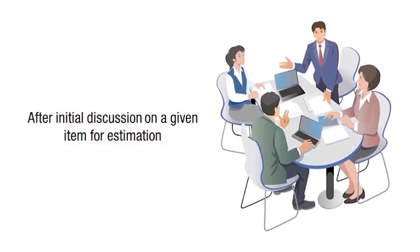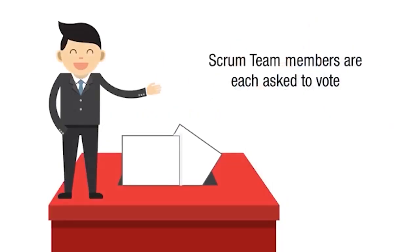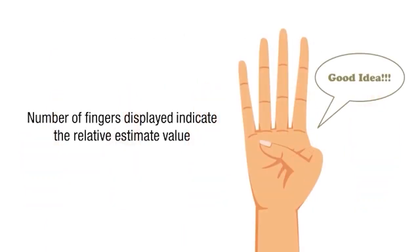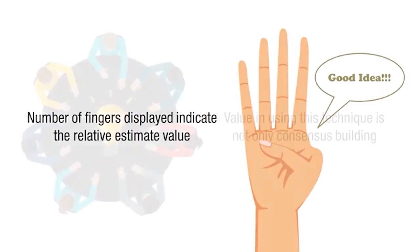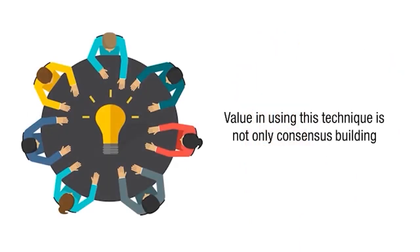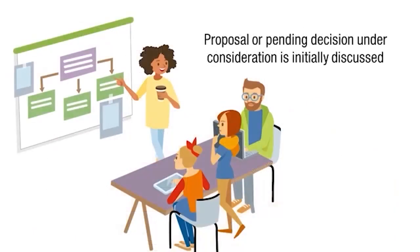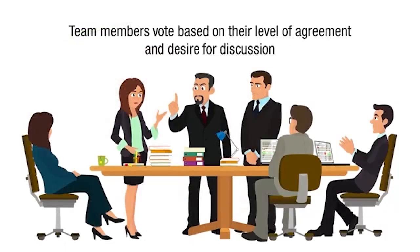After initial discussion on an item for estimation, Scrum Team members are each asked to vote on a scale of one to five using their fingers. The number of fingers displayed indicates the relative estimation value. The value of this technique is not only consensus building but also driving discussion, as team members explain the reason for their estimates. As a consensus building tool, the team votes based on their level of agreement. One finger means disagreement with major concerns.